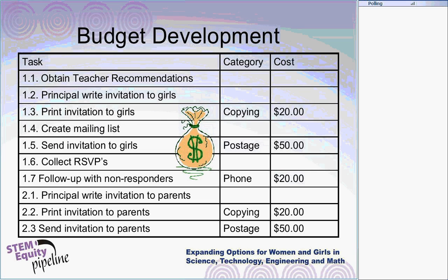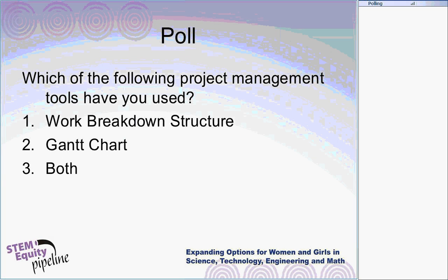And we estimate a cost for each of these items. You would do this for your entire task list. And then you could automatically from this build the budget. And if you are really good about being sure that at the very beginning you identified through your work breakdown structure all of the tasks that makes the whole planning process very simple.